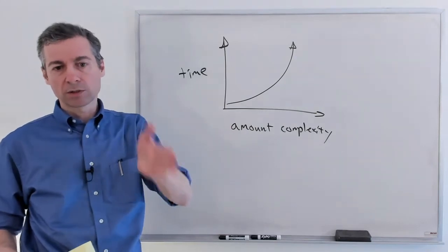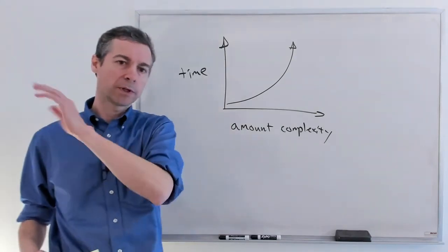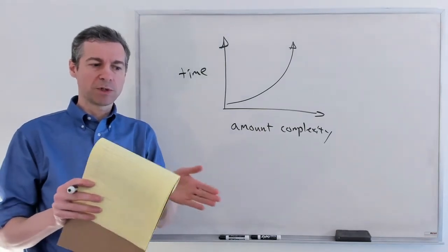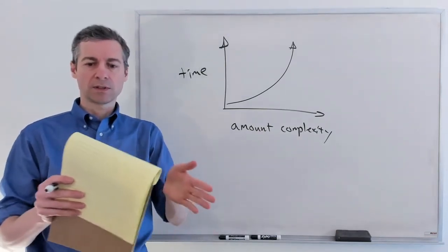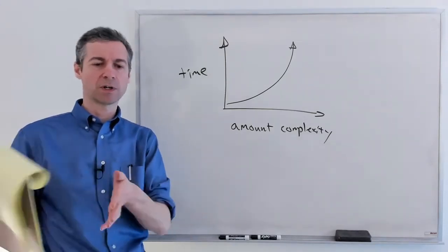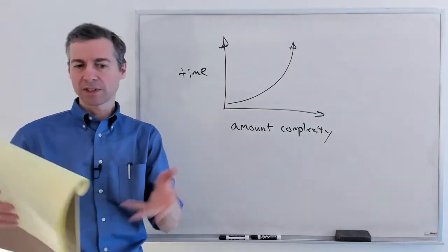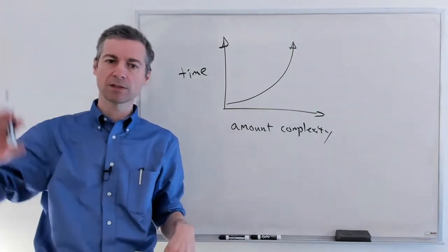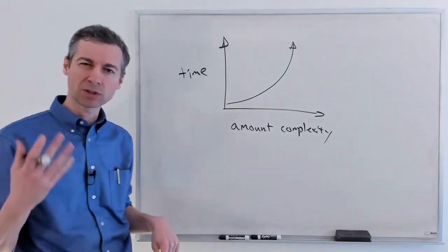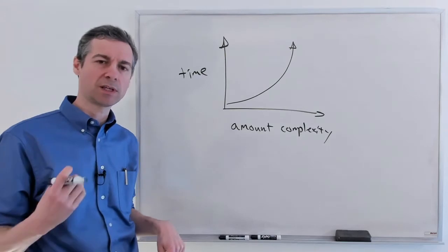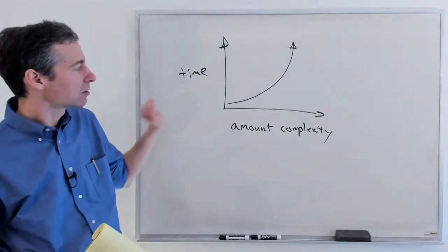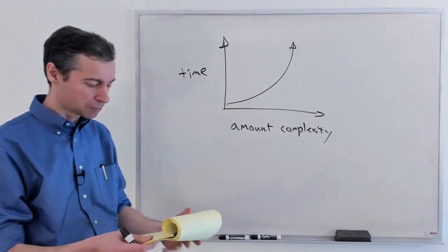They go 1, 2, 4, 8, because we may know that this seems like the size is about twice this, or whatever. It seems a little bit more, but it's in another category, and those sizes have to increase to represent largely that added complexity and uncertainty, that risk that we have in taking on that story. And so this is an important thing to keep in mind.